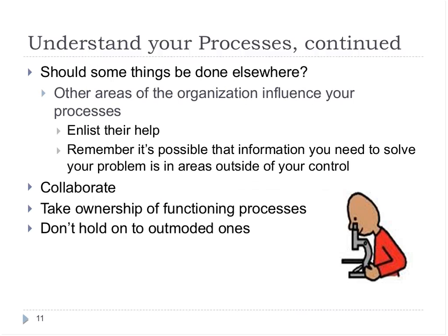If you're working with a project management group, they're going to do a lot of this work with you, hopefully, or for you, but you need to really have some input there to make sure that their project plan is realistic. Timeline, really critical. And I always think that when you're thinking about the timeline and the IT side of things, even when they're just working with a hosted group, with a third-party vendor, no matter how long they say it's going to take, you pretty much need to double that, because it's going to take longer. The IT department has a lot of people wanting things from them and they get interrupted a lot. So always add some time into the timeline for IT.